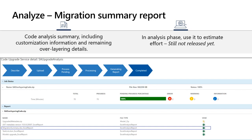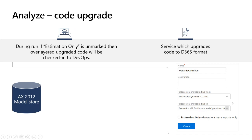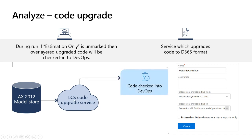The upgrade tool with estimation only selected provides just analysis reports. When the estimation only option is unmarked and you run the actual code upgrade, the service also upgrades your code to Dynamics 365 format and checks it into DevOps. Both the AX 2012 source code and the upgraded Dynamics 365 code will be checked into DevOps so you can pick it up and continue the conversion — and it will also generate the reports.